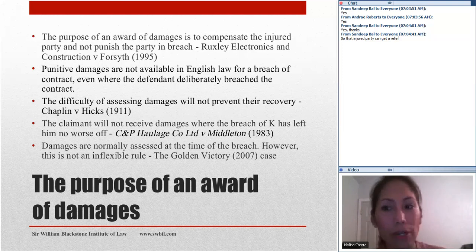The defendant counterclaimed, requesting damages to fix the pool as it should have been. In this case, the trial judge found the diminution of value was zero, and the cost of cure was £21,560. The judge awarded £750 for inconvenience and £2,500 for loss of amenity. However, the Court of Appeal said the cost of rebuilding the pool should be awarded, and the House of Lords upheld an award of £2,500 for loss of amenity.